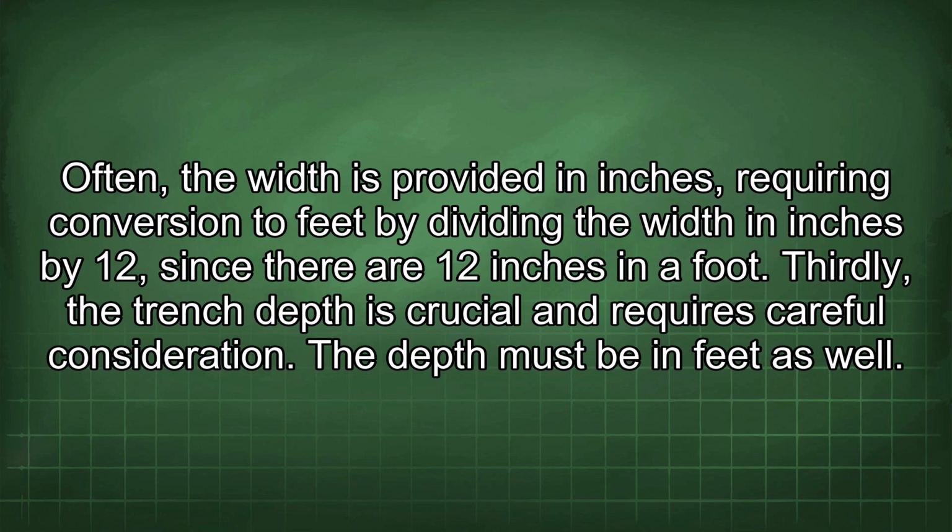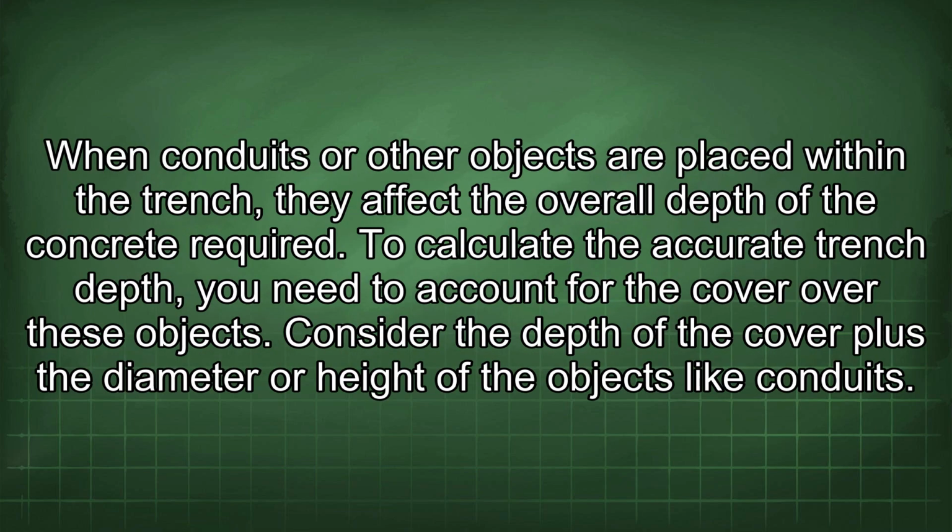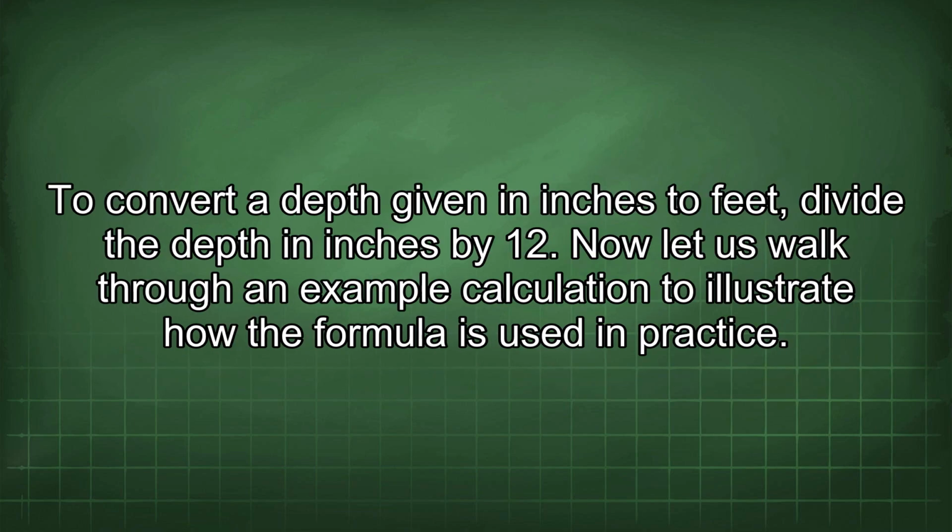Thirdly, the trench depth is crucial and requires careful consideration. The depth must be in feet as well. When conduits or other objects are placed within the trench, they affect the overall depth of the concrete required. To calculate the accurate trench depth, you need to account for the cover over these objects. Consider the depth of the cover plus the diameter or height of the objects like conduits. To convert a depth given in inches to feet, divide the depth in inches by 12.